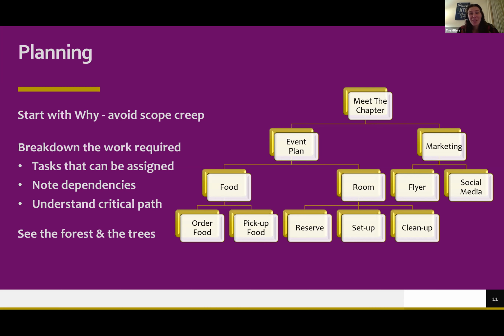So if somebody wants to gold plate a project, or add scope because we have money, there's a conversation of, well, remember, that's an opportunity cost. What else would that money potentially go towards? This scope was approved for this project by our corporate leadership team at this budget. Technically that money is in the checkbook, so to speak, for us to spend, but gold plating a project doesn't get us anywhere. It doesn't do right by the business. It's not integrity for the business, because again, that opportunity cost.